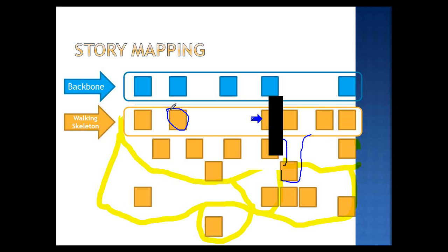And you put it back and you mark it with a dot on the top or something like this to say that one's done, right? So you can then look at the board. You can see quickly, oh, all the ones with the dots in the corner, we know they're the ones that are done. So we don't have to worry about them anymore. And the ones that are purple, or whatever color you use to replace, those are the ones that are in process. So we're good to go with that.